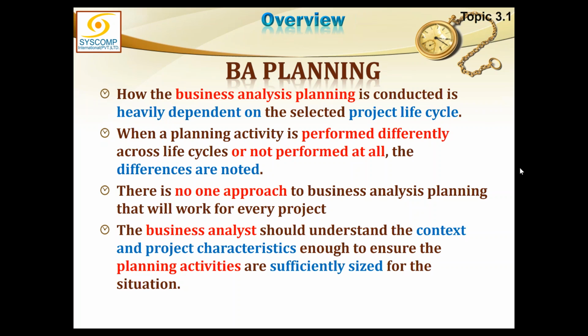You see, project life cycle is suggested beforehand. As far as the project planning is concerned, that is a different subject. Here we select the project life cycle, that is done by the project manager, and as I explained earlier, the business analysis planning is done before the project has even started. You have to come up with certain suggestions. You have to do the whole business analysis. If you do not have an approach, the most appropriate approach has to be selected, and for that I need to have some most appropriate life cycle. So normally the life cycle is decided by the organization. In most cases, organizations have pre-selected mechanisms that if this is going to be this kind of project, then this is the life cycle we are going to use. So life cycles are pre-decided and they are adopted.